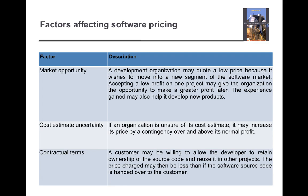The experience gained may also help in developing new products — that is an important aspect of market opportunities. The second factor is cost estimate uncertainty. If an organization is unsure of its cost estimate, it may increase its price by adding a contingency above and beyond its normal profit.